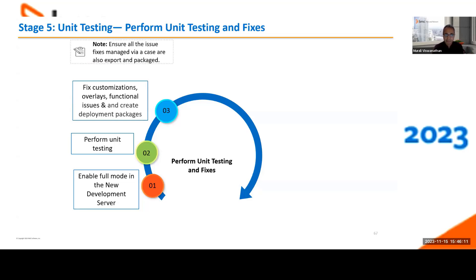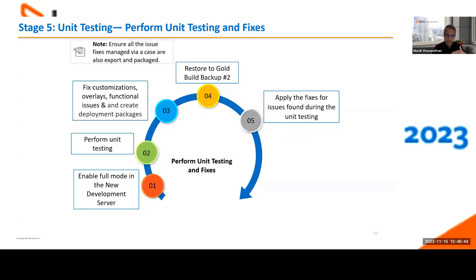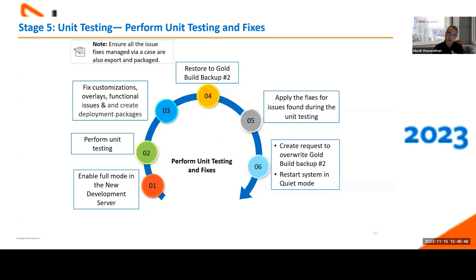Fix any issues found and package them through the Deployment Console as deployment packages. This is how you'll promote changes and fixes from dev to QA and dev to pre-prod during the UAT cycle. We strongly encourage you to practice that during unit testing as well. Also, don't forget to include any BMC-supplied fixes in those packages. Once unit testing is complete and you have your packages, go back to a state with no test data — reapply the fixes from your packages, and take a golden backup to override the previous one. This gives you a clean state with all your fixes applied and your data migrated.